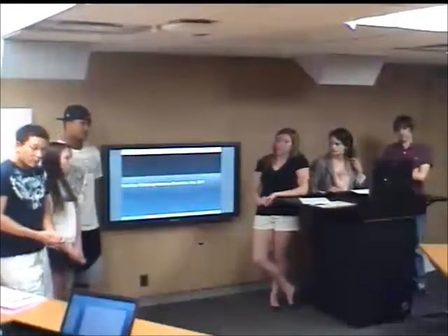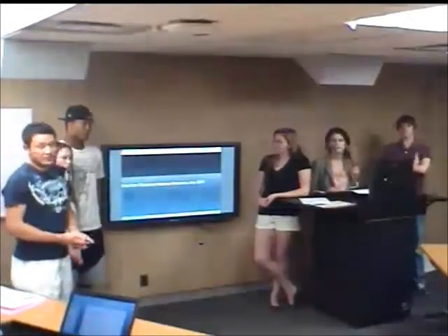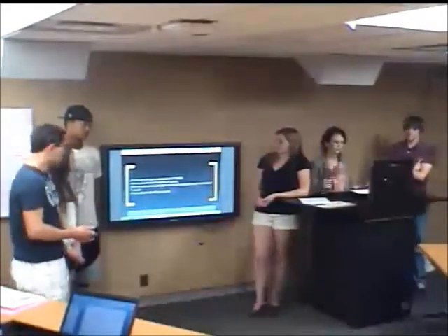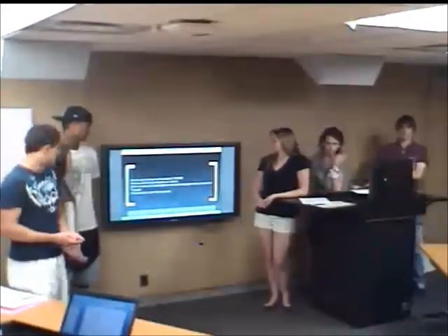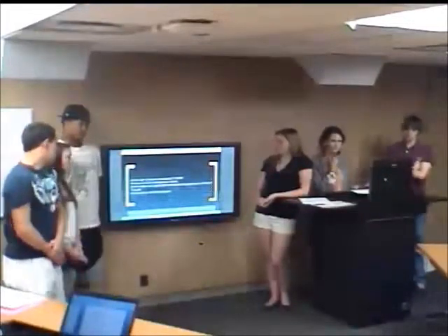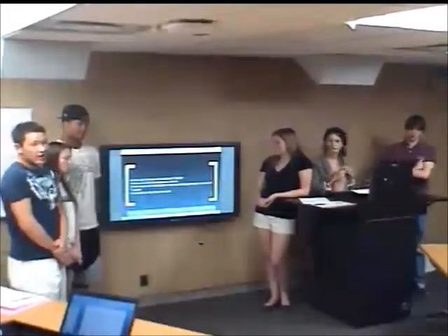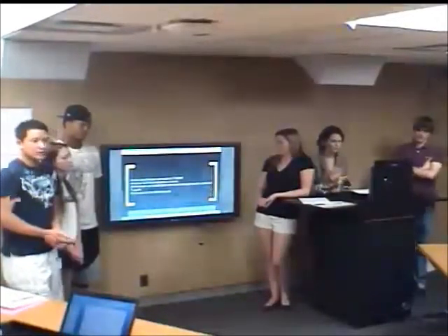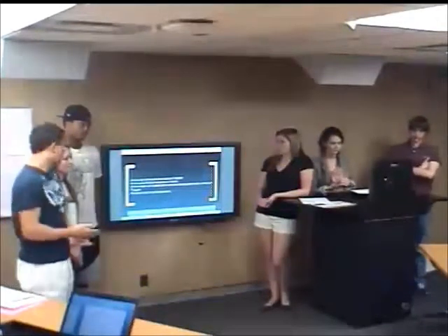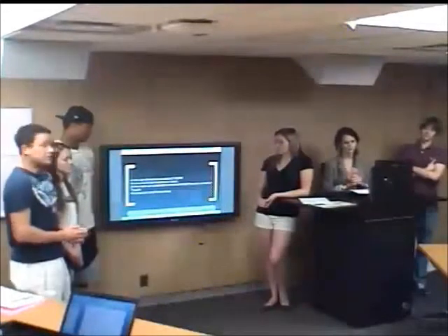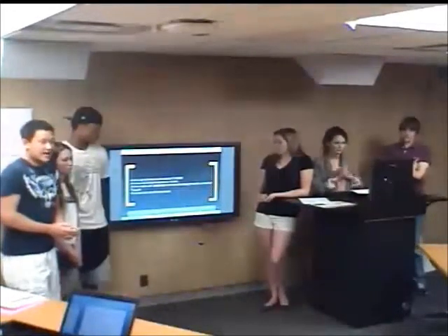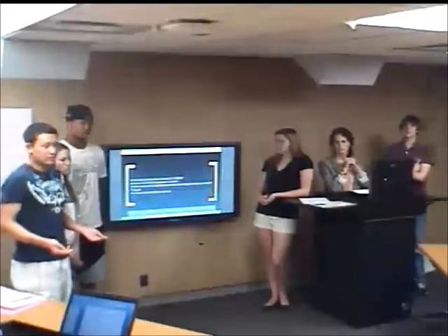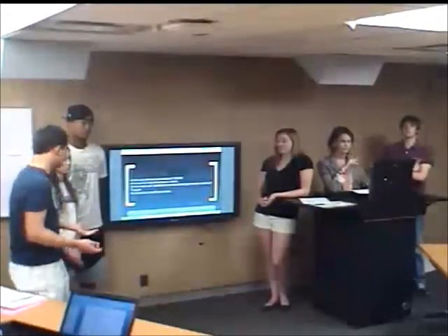Okay, so step 1 is obtaining the necessary funding and the resources we need to carry out this plan, and we're going to start that in May of 2011. The estimated cost of the entire project is about $150,000, and the majority of this cost will come at the beginning of the project. What we want to do is we recognize that the OIT does not have just employees sitting around doing nothing, ready to work on this new project.